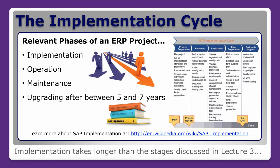At the bottom you can see the project starts, and before blueprinting there's a project kickoff. Generally with an ERP project it's such a big project that you will have a kickoff meeting to get everybody together to say: this is what we're going to achieve, these are the outcomes, this is what success looks like. Project preparation is about planning the project, setting up implementation standards and procedures, executing a kickoff meeting, system setup including production hardware installation, and quality checks.